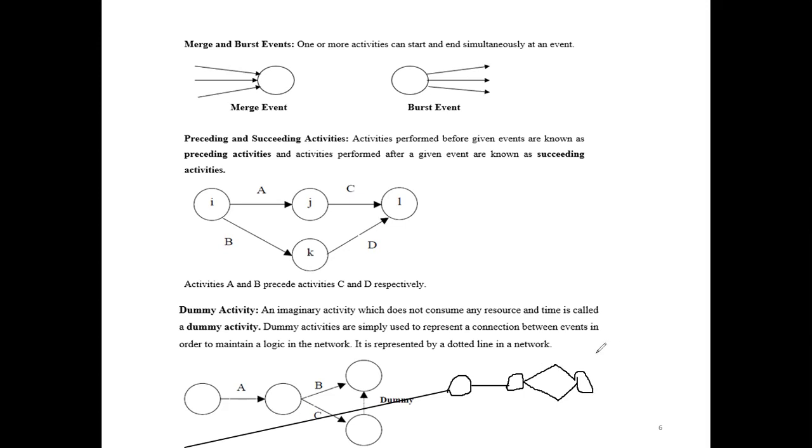So this is actually wrong. How can we fix it? From here, say this activity is B and this is C. You have to make these two activities run parallelly at the same time. Then when they end simultaneously, you make an event.